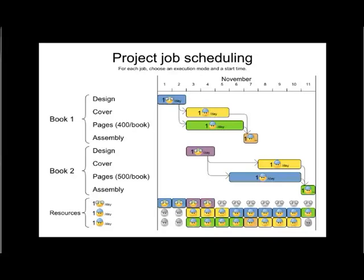Here's an example where we're going to produce two books — Book One and Book Two — 10,000 copies each. To produce Book One, we first need to design the layout, cover, and so forth. This will take our designer two days, so on the first and second of November we'll design the book.